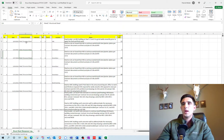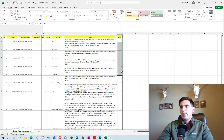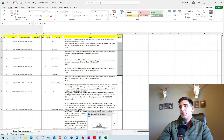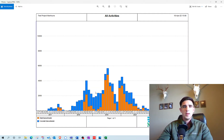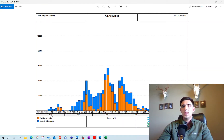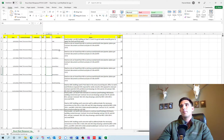Today I wanted to show you how to take a subcontractor's daily report. Here is a steel subcontractor showing the days they were on site, the location they were in, and the total man hours per day. I want to import that information into P6 and create a stacked histogram to show that subcontractor compared to when other subcontractors were on site — specifically steel and concrete over the life of the project. We're starting with this Excel file with the daily report information.